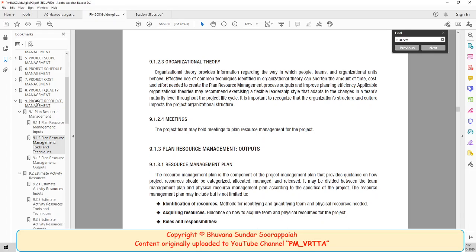That is why you say optimistic plus pessimistic with the same weightage, plus 4 times weightage for the most likely. Then you add this, and in statistics, whenever you are using a weighted formula, you have to add the weights and divide by the sum of the weights. It could be optimistic plus 5 times most likely plus pessimistic. Then it is 1 optimistic, 5 most likely, 1 pessimistic. 1 plus 5 plus 1 is 7, so you should divide by 7.